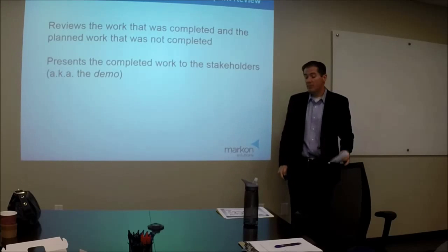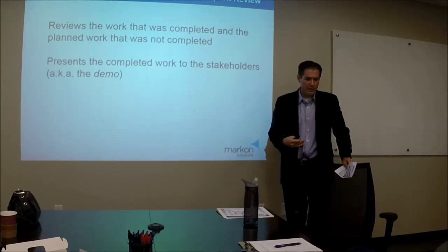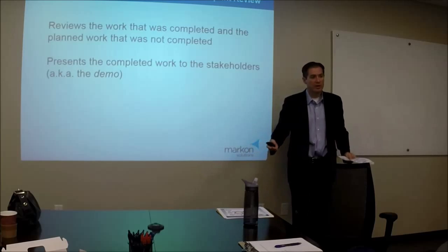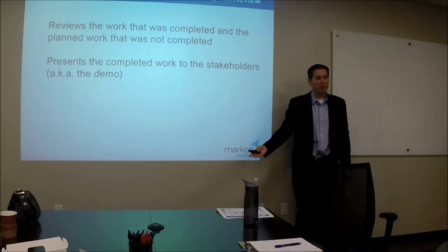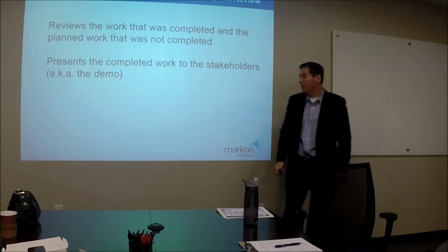The sprint review is a very important meeting. How long should the sprint review go? How long should your demo go? The answer is 1 hour, or 1 hour for every week of sprint you had. So if you just spent 4 weeks doing work, do you have 4 hours worth of product to demo? And that's kind of a roundabout idea.